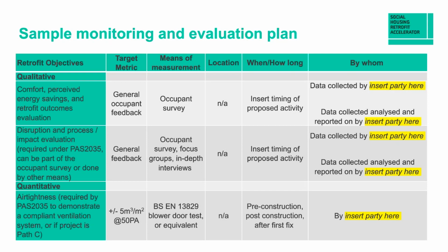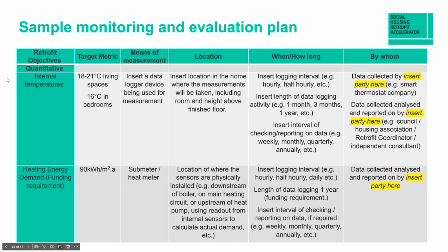So one of the things you can do when you've got air pressure testing, airtightness testing, is you do that, and if it's not achieving the outcome that you want, you can do a smoke test. So you would have a little smoke producing element, and then you'd run the air pressure test, and it would identify where the smoke is going, and that's where you're having the heat loss generally. So they are normally carried out by specialists, so it's not something you'd normally do unless you had the qualifications to do so.